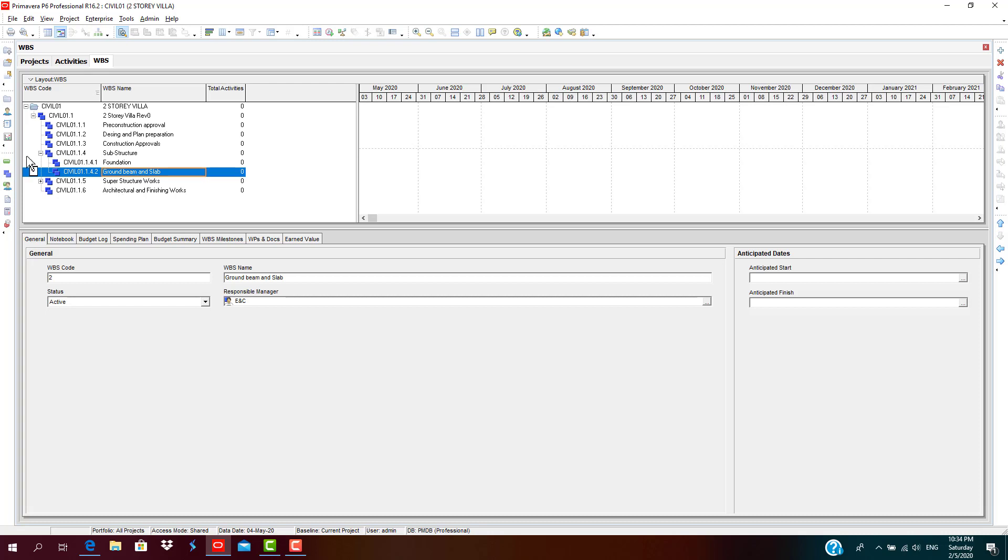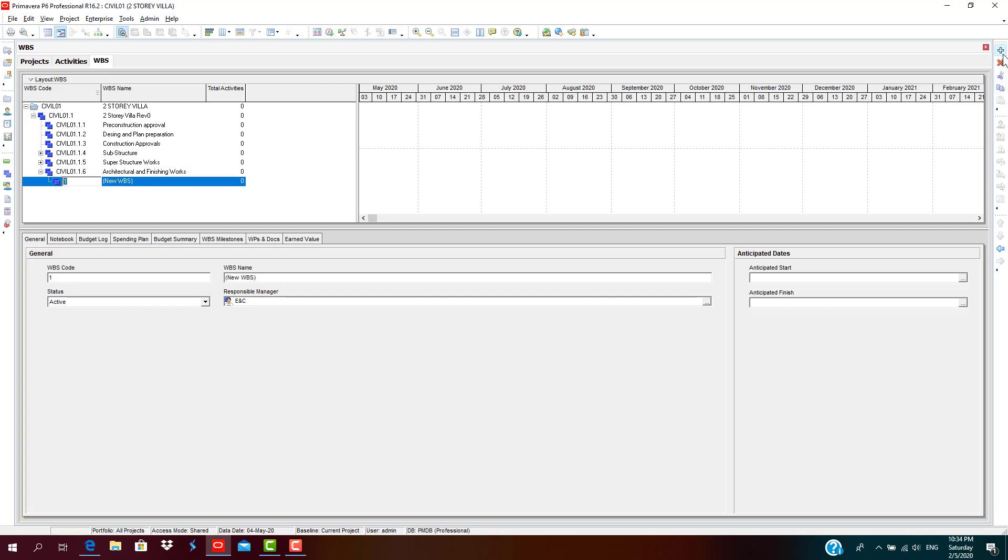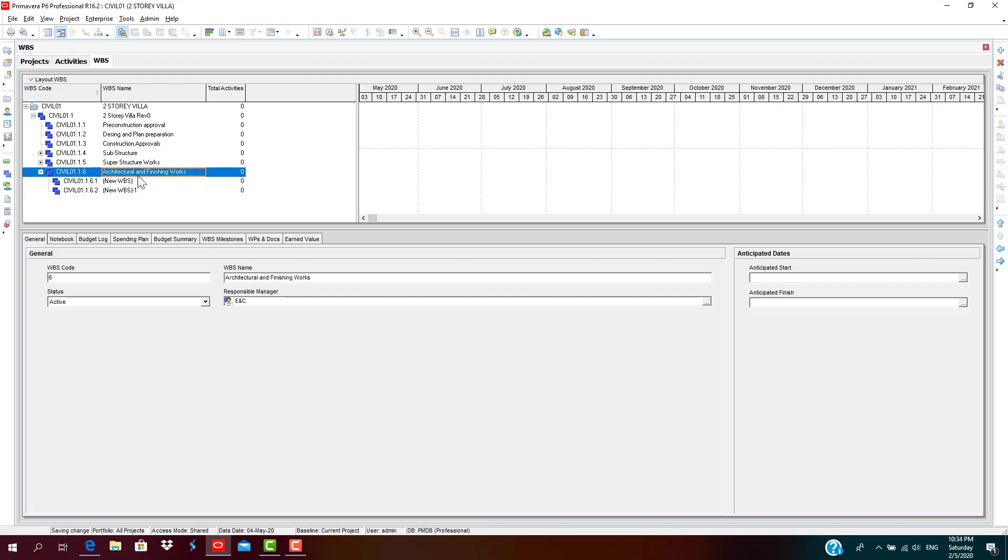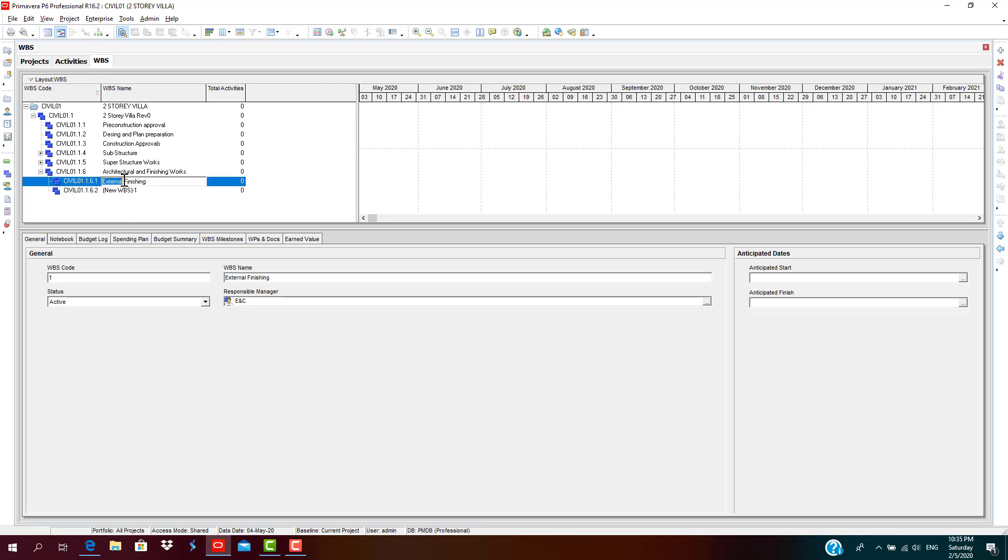So we have shown these details under superstructure, details such as foundation, ground beam and slab under substructure. Now architectural and finishing works, I will not take much time in going into all these details. I will just add two WBS aspects like external finishing, internal finishing. Now the first thing is we do internal finishing, then we go for external finishing.